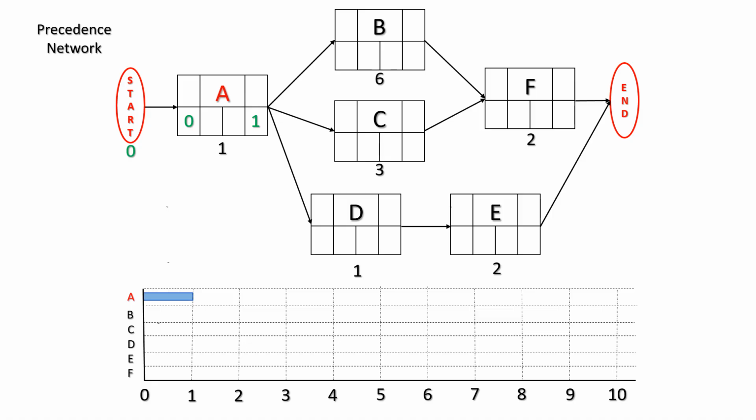And this becomes the early start bar chart. It is the earliest performance of A plotted on a time scale. Notice that it is the result of the logic and sequence and the durations of the activities.